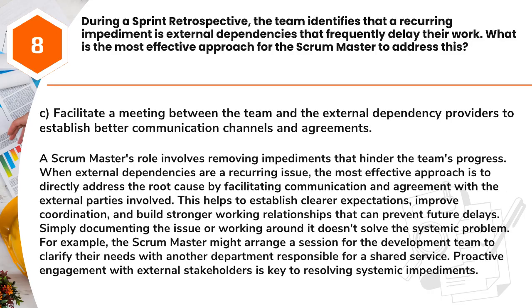Answer: C. Facilitate a meeting between the team and the external dependency providers to establish better communication channels and agreements. A Scrum Master's role involves removing impediments that hinder the team's progress. When external dependencies are a recurring issue, the most effective approach is to directly address the root cause by facilitating communication and agreement with the external parties involved.